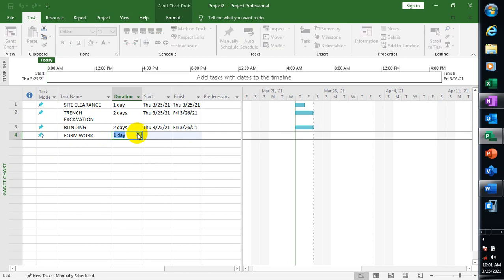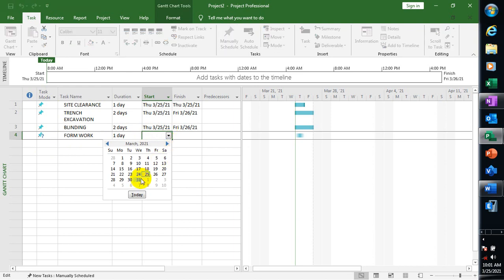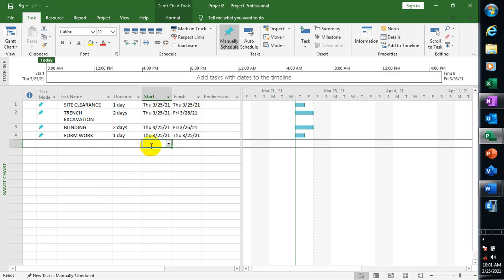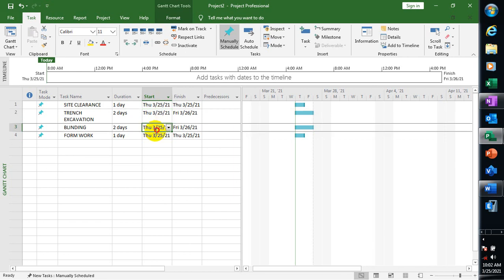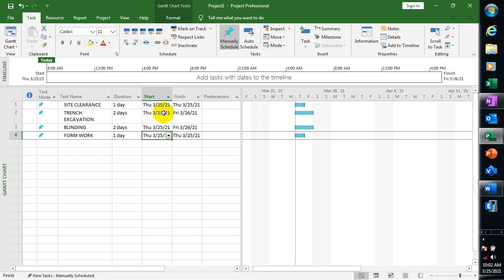And 'Formwork' — one day is enough. Now if you look at the right-hand side you can see our Gantt chart. You can see we are starting on the 25th of March 2001. Each task has a number: Site Clearance is number 1, Trench Excavation is number 2, Blinding is 3, and Formwork is 4.